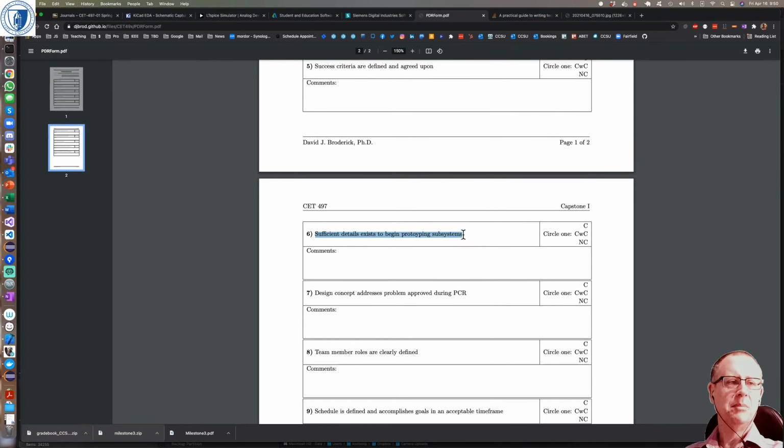You've got to buy maybe manufacturing machines. You've got to buy materials. And the preliminary design review, we called it PDR at United Technologies, when it was called United Technologies, was actually three options: a go, a no-go, or a redirect. And redirect meant you had to redo the presentation because somebody didn't like something in it. And if you didn't get a go, that meant you couldn't move on to the next step.